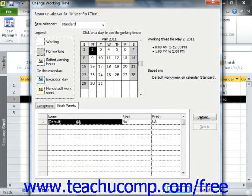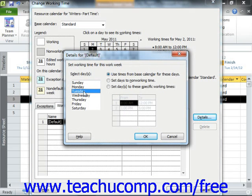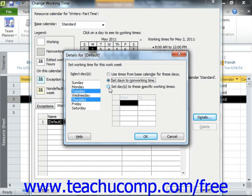For whichever schedule you are editing, click the Details button in order to open the Details dialog box. Here you can select the desired day or days of the week to edit by choosing them from the Select Days list at the left side of the dialog box. To the right, you can either select Set the Days to Non-Working Time, or select Set Days to These Specific Working Times. Note that choosing Use Time from Base Calendar for These Days does nothing to the scheduled days. If you selected Set Days to These Specific Working Times, then set the available working hours for those selected days in the From and To columns.